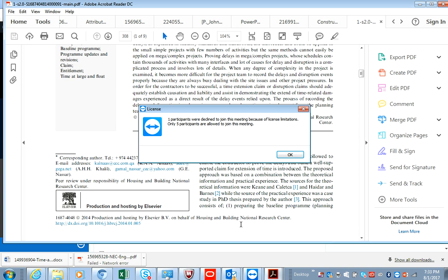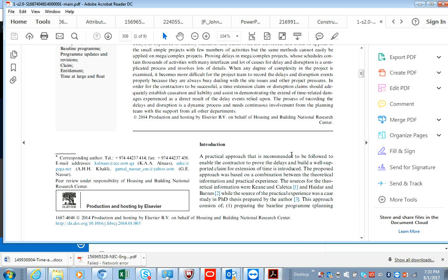not necessarily just the planned completion, because what you would have is the contractors start raising early warning notices for any and everything on the project. So as soon as they highlight or they hit a snag, they'll raise an early warning notice. So what you would have is, if these early warning notices are not controlled or managed in an accurate manner, you end up with an information overload within the program for majority of issues that are not closed out within